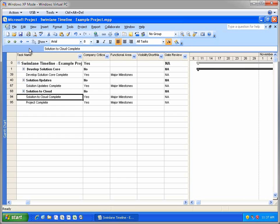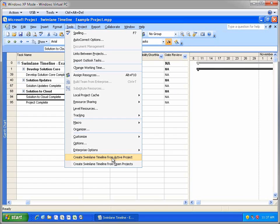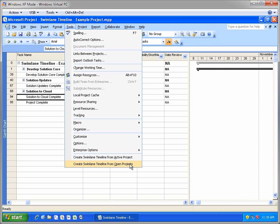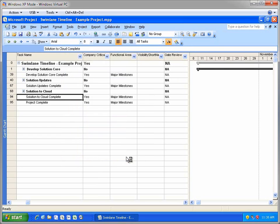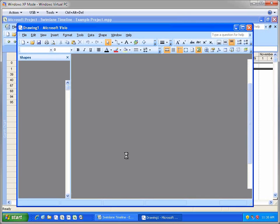There are a number of ways that you can start the Swimlane Timeline. In Project 2003 and 2007, you'll find the Create Swimlane Timeline options added to the Tools menu. So without leaving Project, you can create a Swimlane Timeline report. Notice you can create a Swimlane Timeline from either the current active project, or from all open projects if you want to create a portfolio view. Let's create a Swimlane Timeline from this single active project.